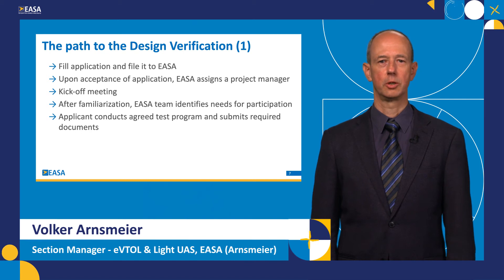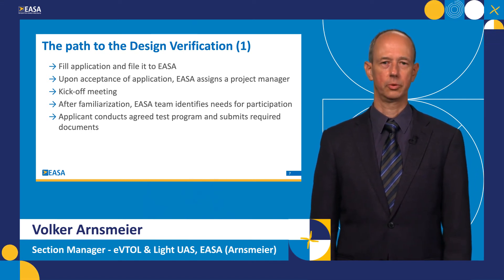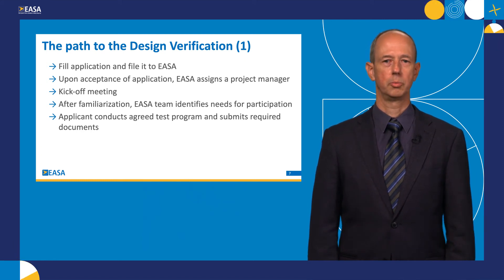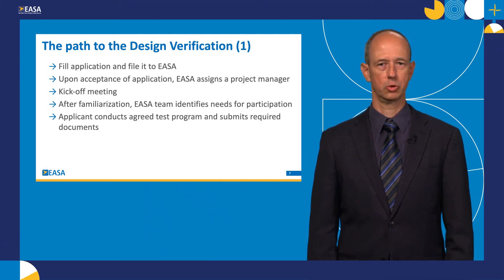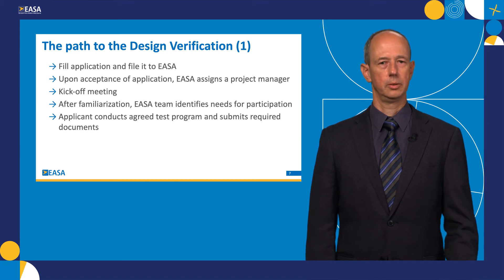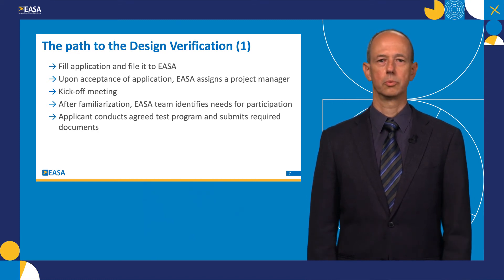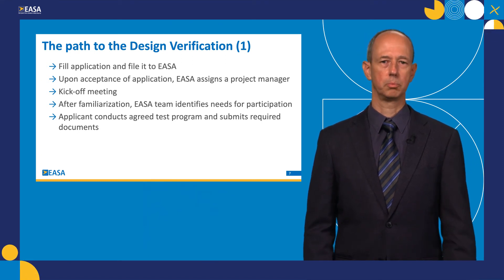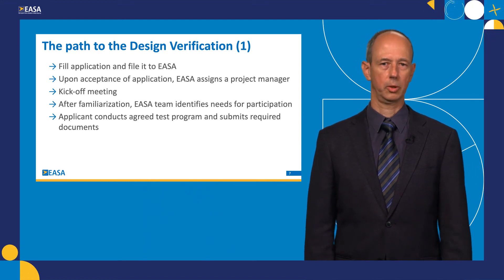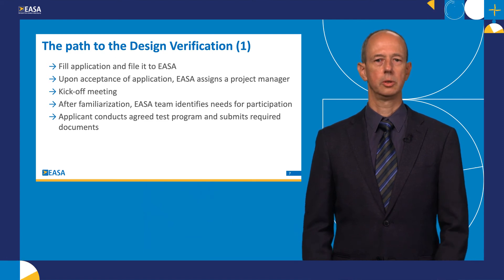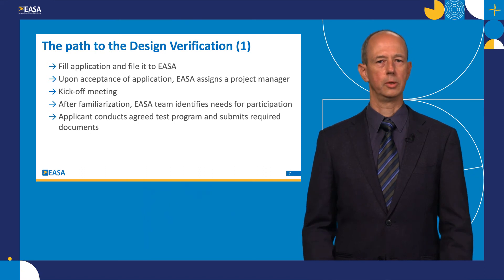Hello, my name is Volker Ansmeyer. I'm section manager of the eVTOL and Light UAS section. We are in charge of performing the design verification activities. You've already heard from Antonio about the assessments to be performed before filing the application to us. Now it's time to actually file the application. Please use the format that you can find on our website, and use the filling instructions which are linked on the last page. With this initial information, we will perform an initial review to see whether your application and the proposed design is in principle acceptable. If there are features which might be life-threatening, we may raise questions before accepting it. We will then accept your application and assign internally an EASA project manager, who will also involve relevant experts for the domains to be investigated.